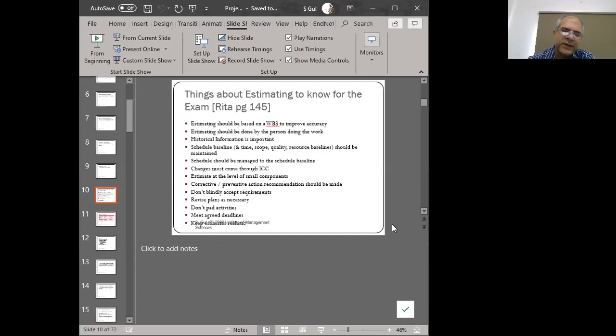And once we decide to integrate a change, we have to not only update our plans, we also have to make that assignable. We have to give that task to somebody, then we have to monitor it and control it and all that. Those things will also happen, right? Now, estimation of activities should not take place at the overall level of that activity. Rather, estimates have to take place at each individual little work package that takes place within an activity, right? So we're estimating at the smallest level, and then we're combining our estimates together to form the overall estimate.